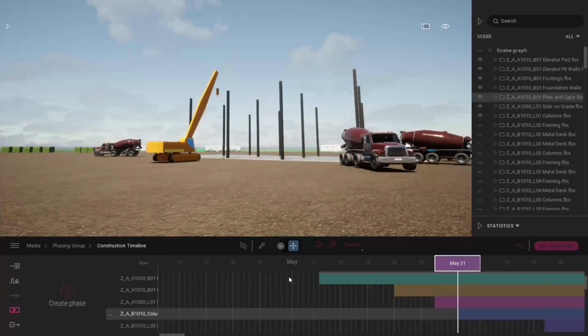To me, that seemed like a ton of additional work that I personally didn't want to do or have the time to do. If we wanted to convey the same idea with the same accuracy, it's possible, but Rich mentioned it took 2 to 3 weeks to do all of that data aggregation and data conditioning from Assemble to Navisworks. If we were to set this up in Twinmotion, you're probably talking an additional 2 to 3 weeks to set this timeline up. So possible, yes. Practical, probably not.